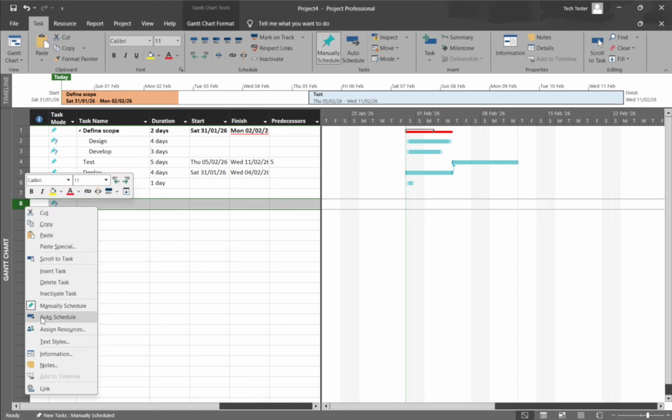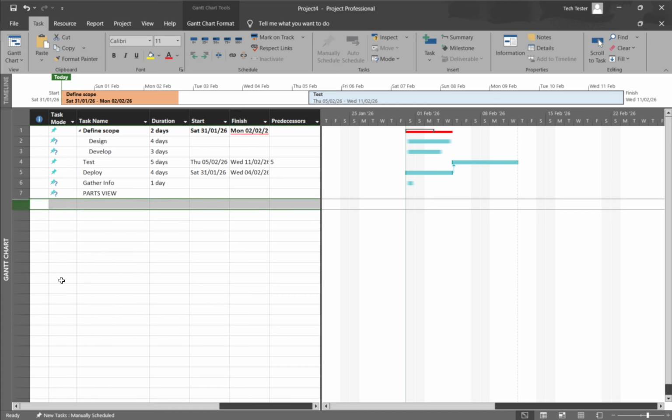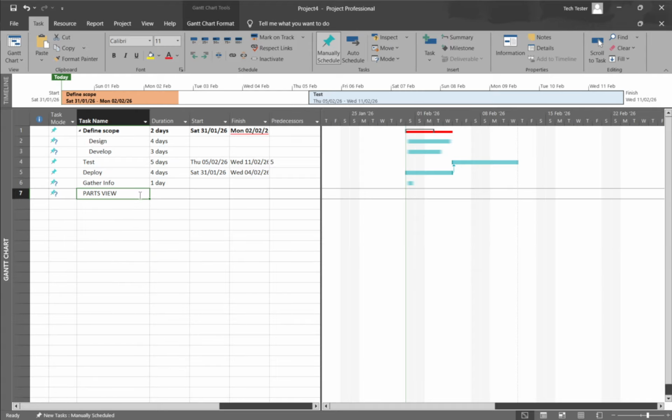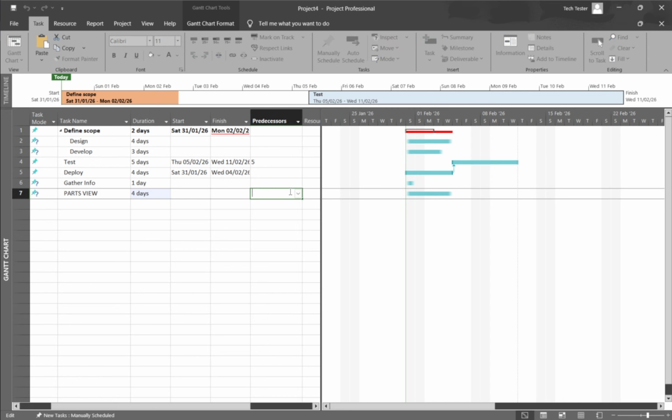When you want to add tasks and capture more detail at the same time, stay in the Gantt chart view and turn on the Details area to split the screen. In the lower pane, you'll see the task form. Here, you can enter the task's name, set the duration, assign resources, and define predecessors before you click OK to save. This approach is especially useful when you already know how tasks relate to each other, or when you're building a sequence that needs clear dependencies and assignments right away.